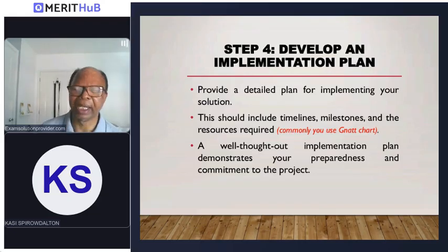Okay, that's fine. So then there is also critical path analysis, which obviously is called network analysis. The critical path analysis helps you to look at the activities that you need to implement. So activities where you cannot have a slack time, which means they can't be delayed. They have to be finished on time. So if this is going to take 1 week, it has to be 1 week. But the others which have got a shorter time, it means they can wait maybe for 2 days or 3 days or 4 days or 1 week. Now, that period is called a slack period.